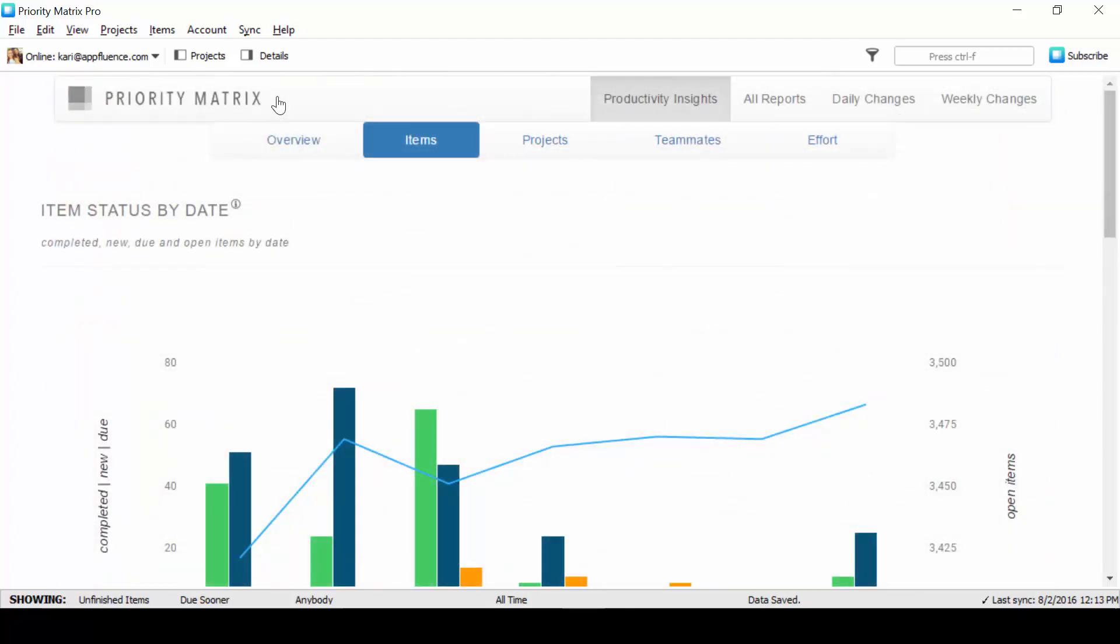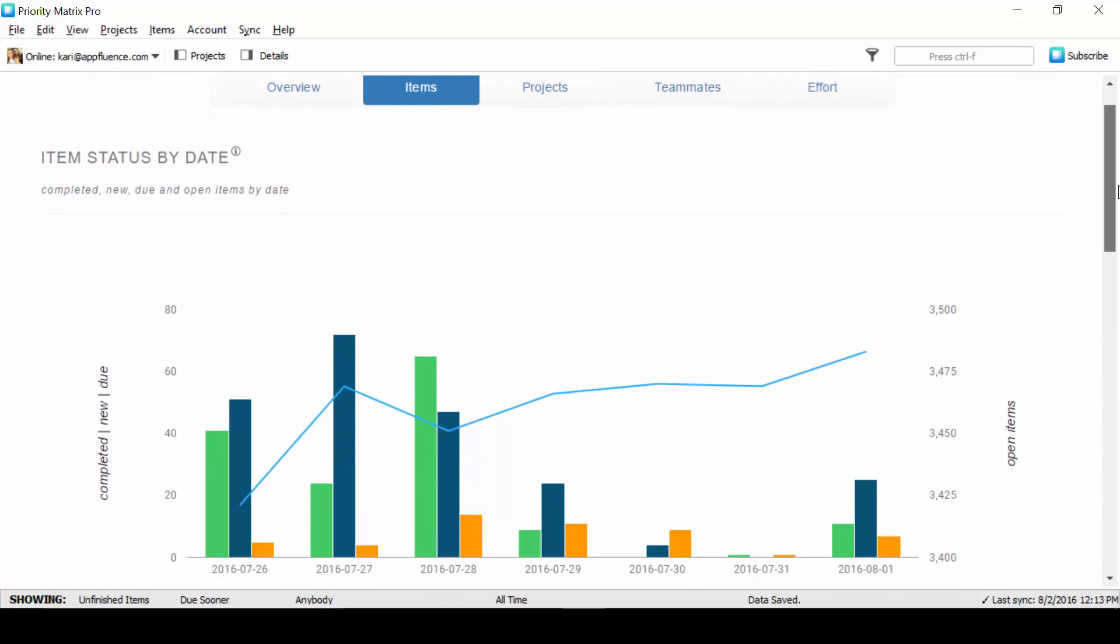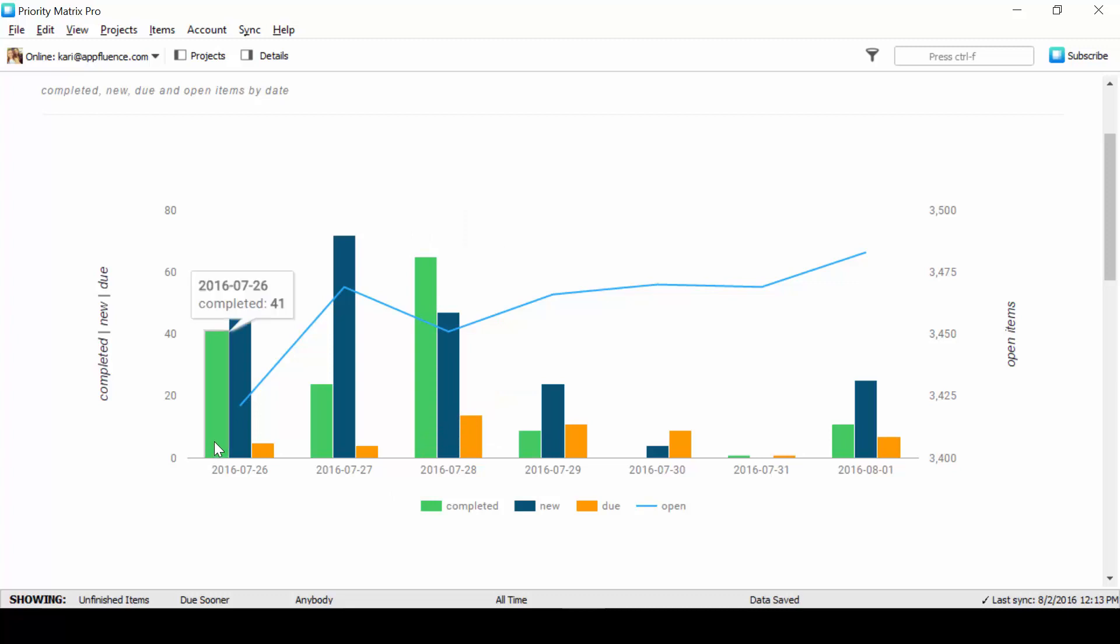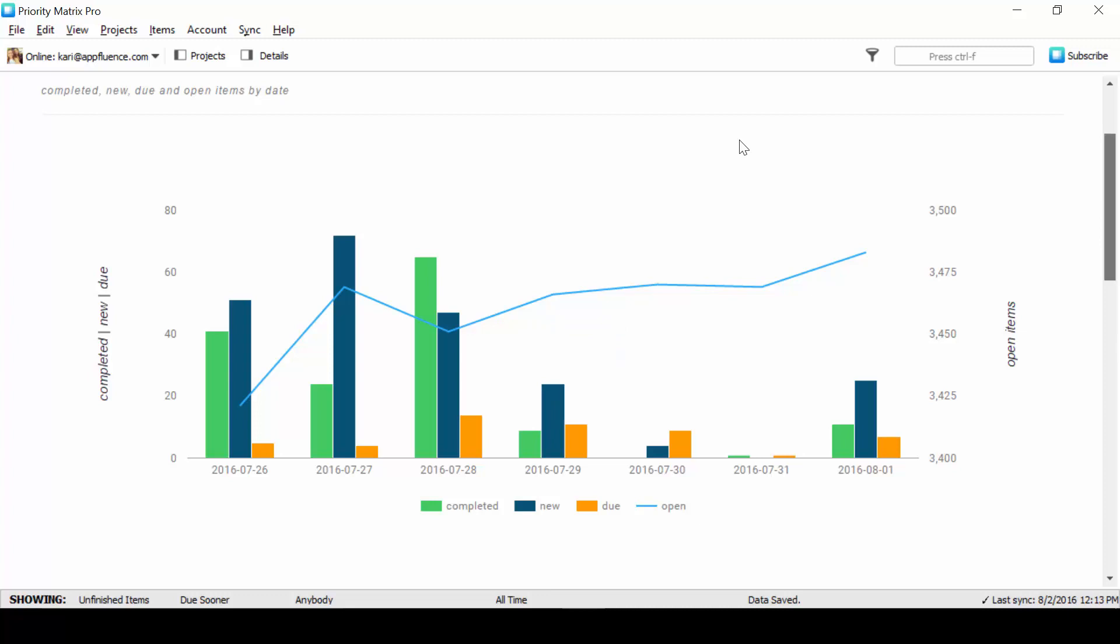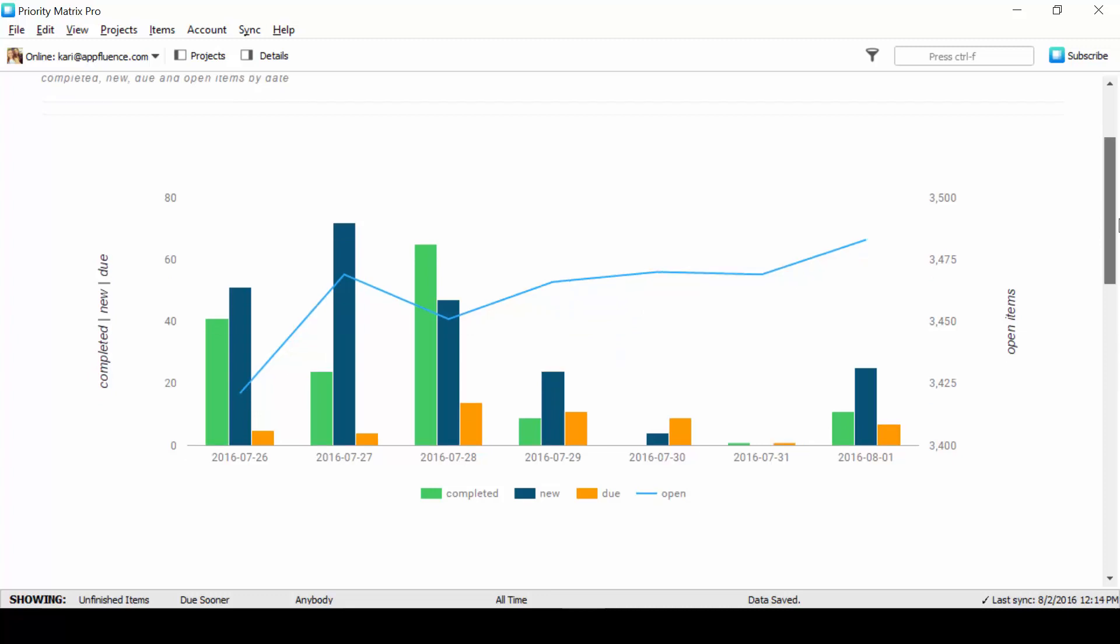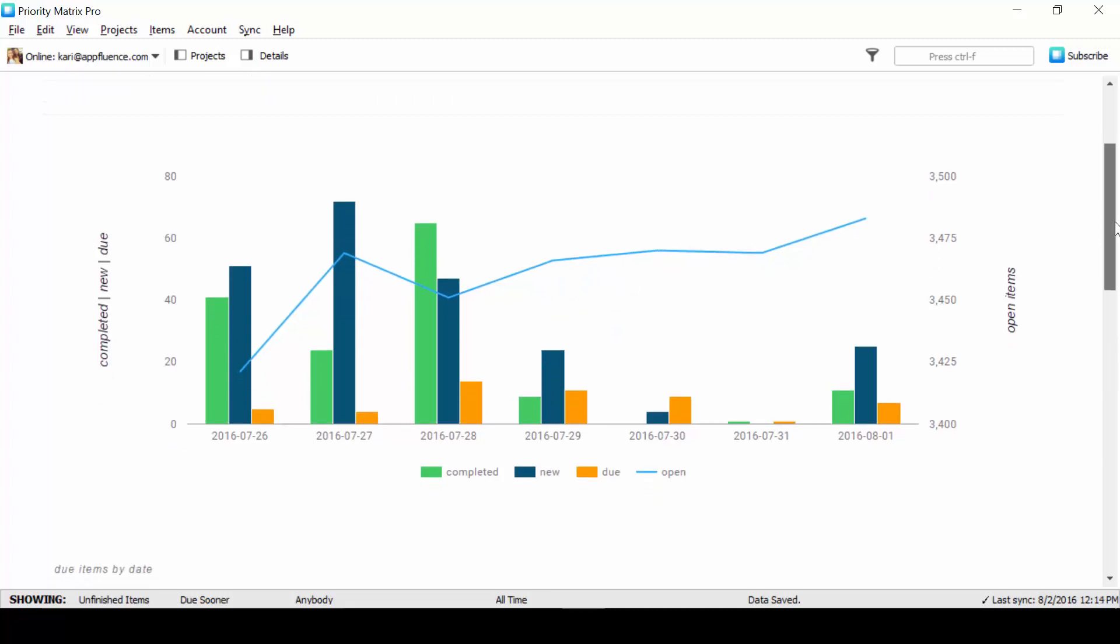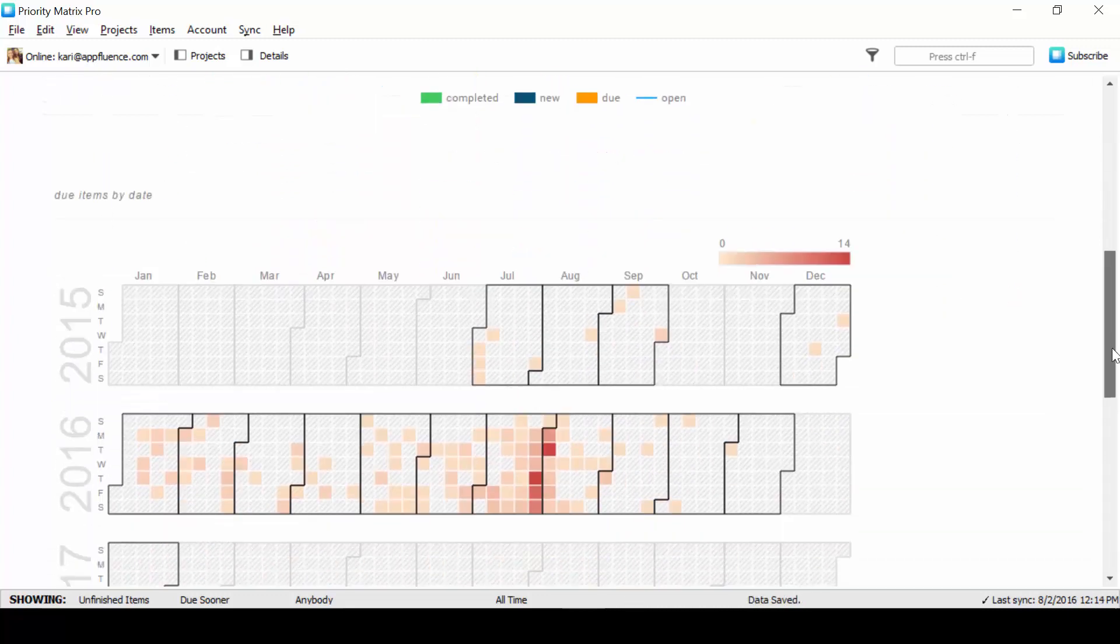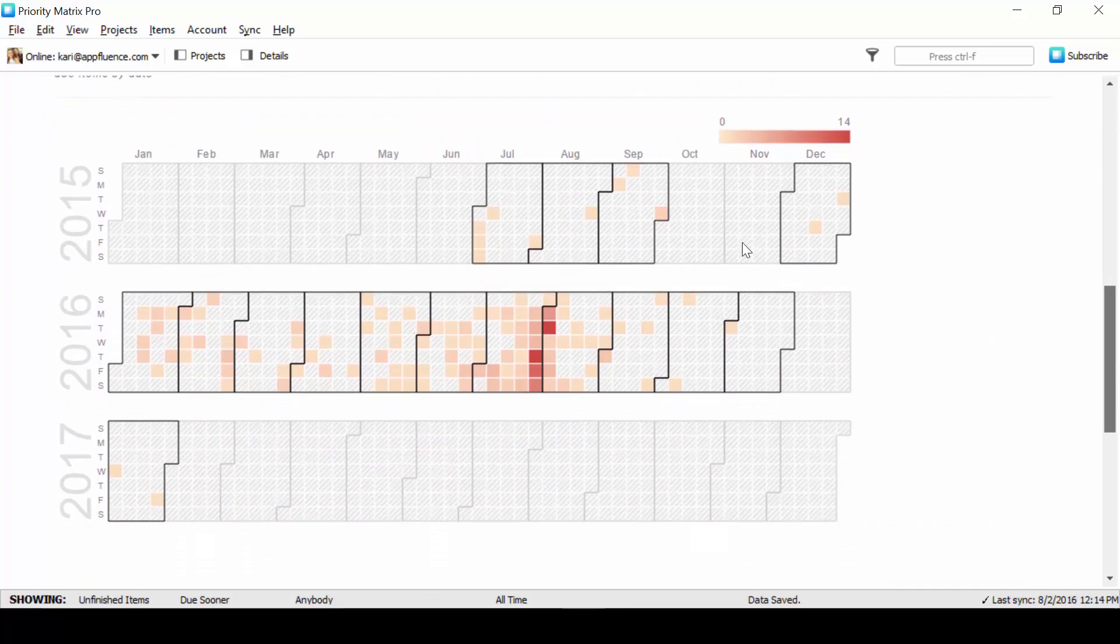Next up, our item progress will help you find when your team is most productive. For us, we can see we completed the most items last Thursday and last Tuesday. We also know that we shouldn't expect to finish much on Fridays as this is when we usually brainstorm and create the most new items. Using this item progress report, you'll quickly be able to find out when your team is the most active and then you can schedule around it to help your team work most effectively.